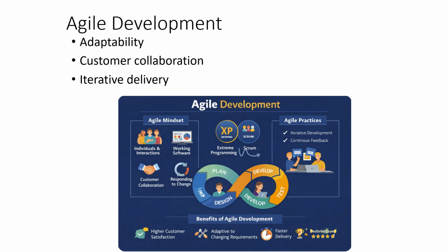5 stages of the Agile life cycle. The first stage is the project initiation. During this stage, an Agile project charter is developed to discuss the project vision and ROI, return on investment justifications. Second stage is the planning. It includes building a backlog, which means to discuss and create a backlog at the story level.